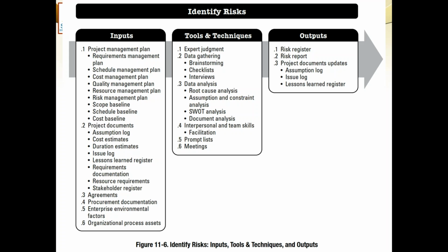Then the schedule management plan is the greatest source of risk, because schedule is the most vivid kind of plan, which keeps changing like a jelly. It shakes all the time like a jelly, and it can change every time. Therefore, I must take special care and must try to identify the risks in the schedule, because all other management plans or all other knowledge areas, whatever they do, are ultimately going to impact the schedule.